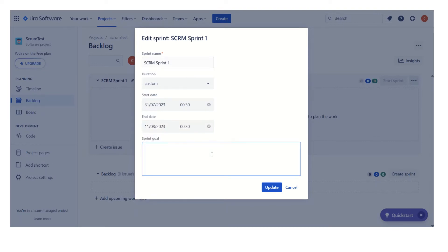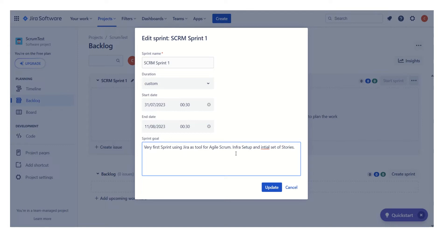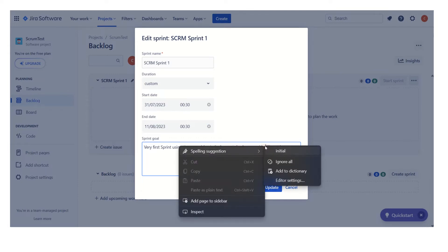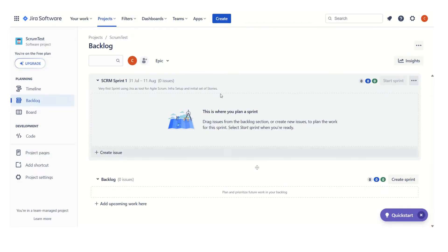So it is a two-week sprint. In the sprint goal field we can specify the sprint goal. This is a high-level goal: we want to start on Jira in this very first sprint, do the necessary infra setup, and work on the initial set of user stories. Here we can see our sprint is defined — it will start on the 31st and end on 11th of August, a two-week sprint, with the sprint goal we have written.